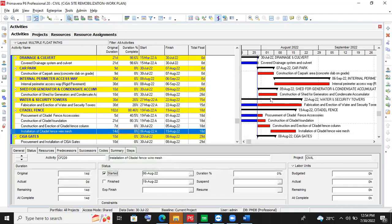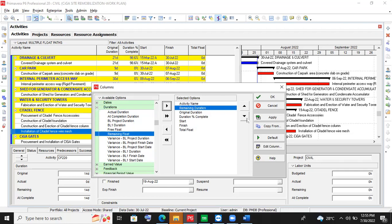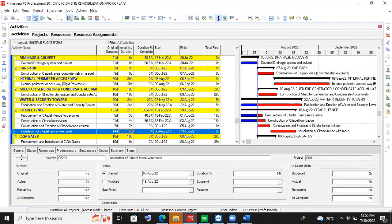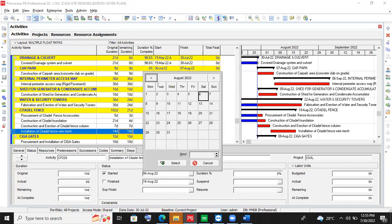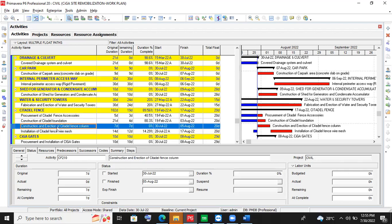Click okay — original duration, then I'll add another one: remaining duration. I said it started on the 28th of July. When I said that, it has expanded two days. So remaining: 12 days out of 14 days. I spent two days, so it's now 14.29 percent complete. Whereas from the logic, it's supposed to start after the completion of the construction and erection of started fence column.